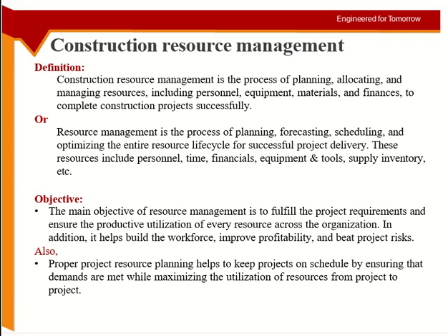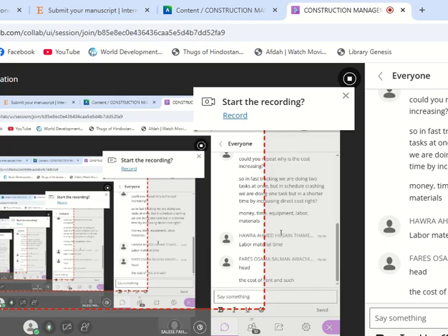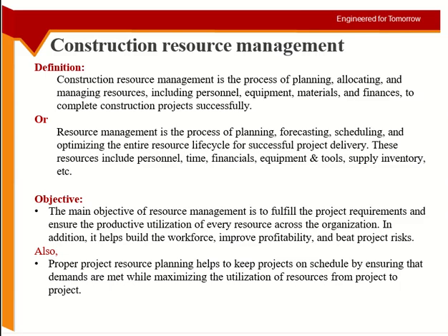So there's something which we call idle time. Okay, so you have a mixer, and that mixer is not operating for 3, 4, 5 weeks. If you keep any equipment like this, it will start to get damaged. So you have to make sure that from project to project there's no big gap in the utilization of the resources. So when the resource gets to the project, it is utilized there, and then you shift it to another project.